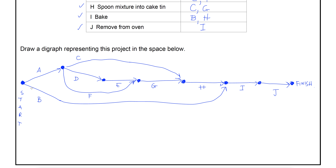That is our first activity network drawn. We'll do a little bit of practice. Just over the page we have an activity network that is already drawn for us. You'll notice not only does each edge have a letter, but also a number next to each label. The labels are on the edges, not on the vertices, because it's the edges that represent the activities. The numbers represent the duration of the particular activity — how long it takes to complete.